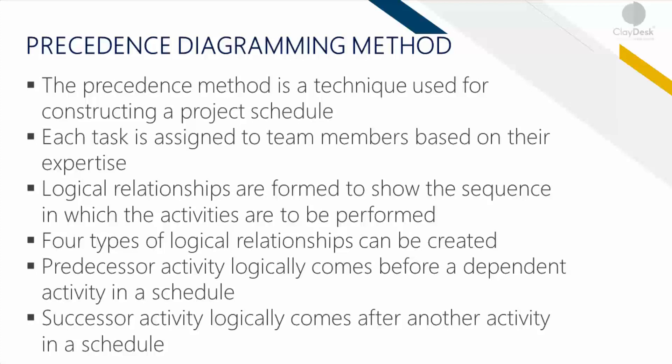PDM is a technique used for constructing a schedule model in which activities are represented by nodes and are graphically linked by one or more relationships to show the sequence in which the activities are performed. PDM includes four types of dependencies or logical relationships. The predecessor activity logically comes before a dependent activity in a schedule, and a successor activity logically comes after another activity.